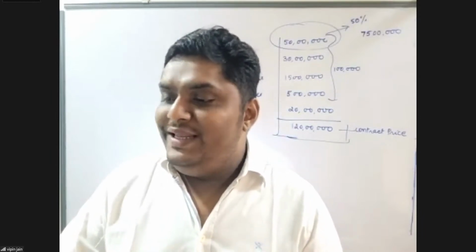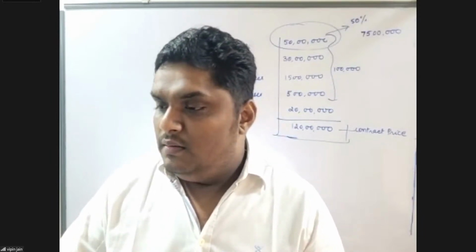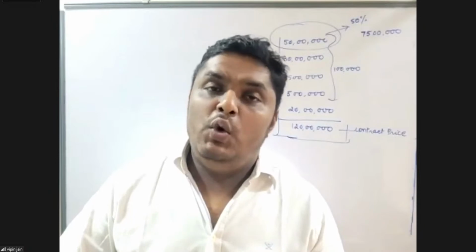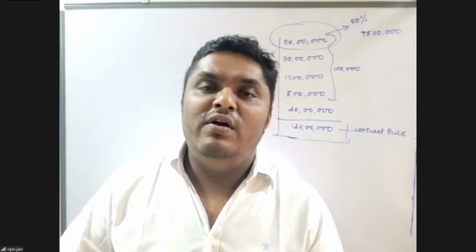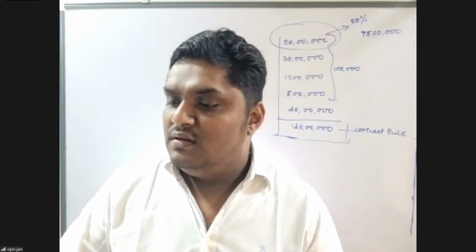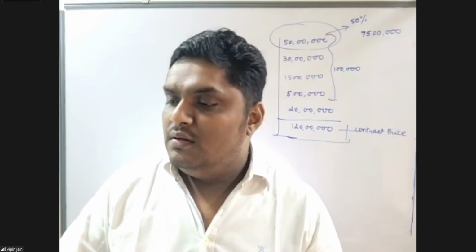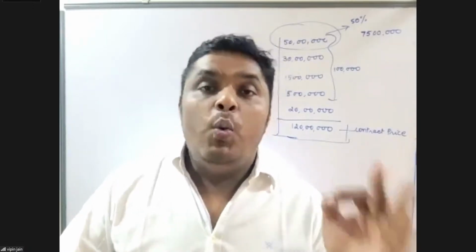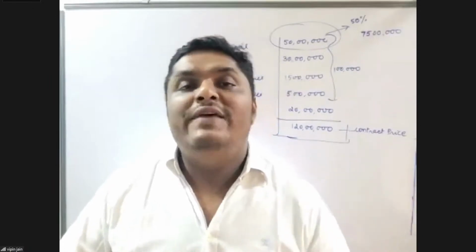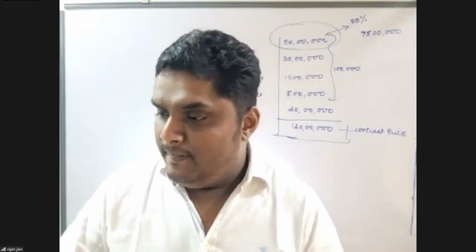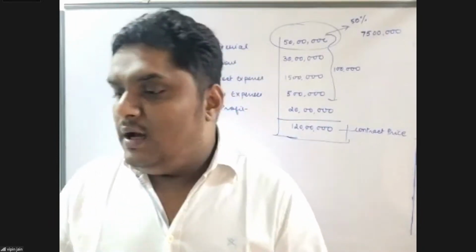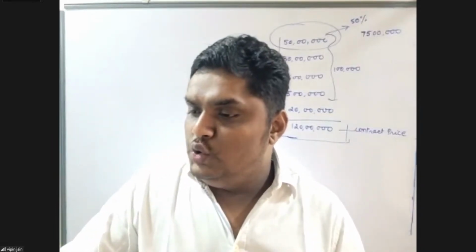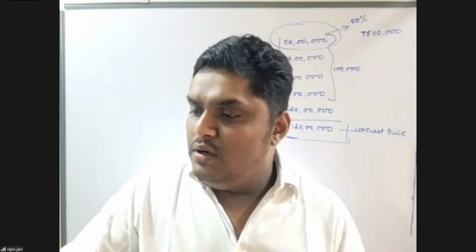Keshav Goyal, hopefully your query is resolved. The profit will be recorded only when the work is certified. That's why we record work uncertified at cost. Work certified at selling price and work uncertified at cost. Once the work is certified, only then will we recognize the profit element. Keshav, Miss Abhirami, any doubts? Dikshita, Himanshu, hopefully your query is resolved.